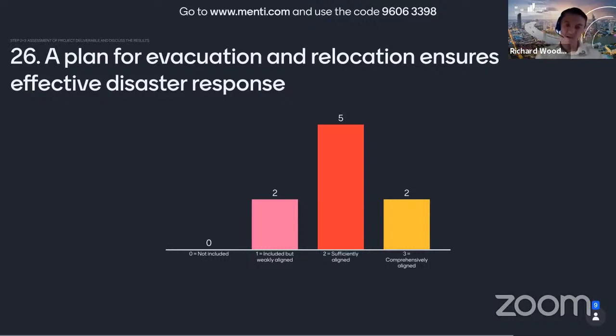So on this particular sustainability principle, I personally scored this as a 1, because at this particular stage of the project, some of the deliverables relating to this work are later in the program and haven't actually been issued yet. They're being worked on and planned. So it's important to remember that when we do this assessment, we're looking at the current progress at this time. As a team leader, I need to be confident that I have a plan to achieve a higher score later.